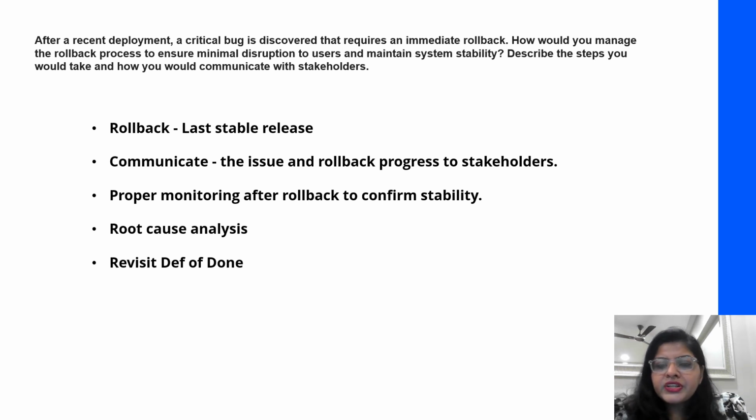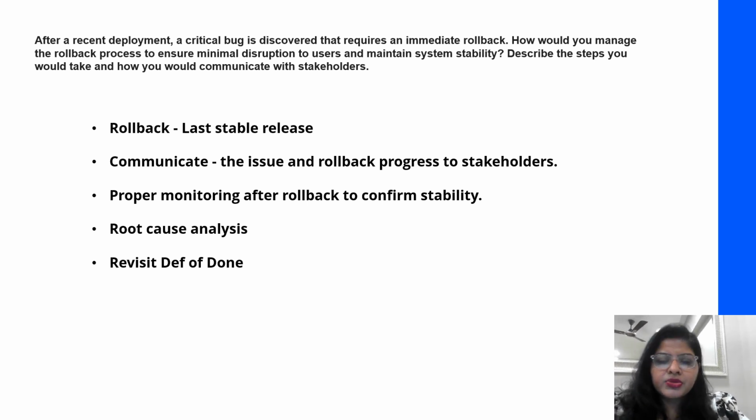So what we did was we revisited our definition of done. For such scenarios, what do we do? Was the end-to-end testing enough? How can we test it better? We also identified that the code which we were checking was pointing to simulator code. So we ensured that going forward, in all the release cycles, we are going to code it and test it on the real-time responses and not just the simulator one. So that helped us gain back and improve further opportunities as well.